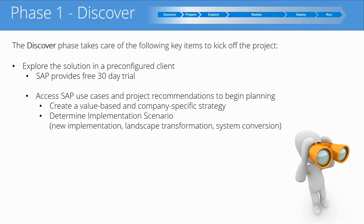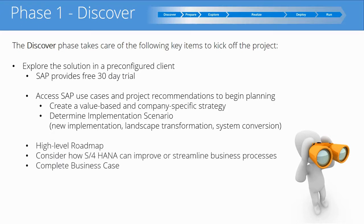The team will want to create a value-based and company-specific strategy designed specifically for this implementation, and there is a lot of help available in the SAP documentation for that. They will also want to determine the implementation scenario — whether this is going to be a new implementation, a landscape transformation, or a system conversion. Next, they'll look at a high-level roadmap of the entire project and consider how S4 HANA can improve or streamline business processes. This is the beginning of a fit-gap analysis. Finally, they'll complete a business case to present to management as a gate to exit the Discover phase.